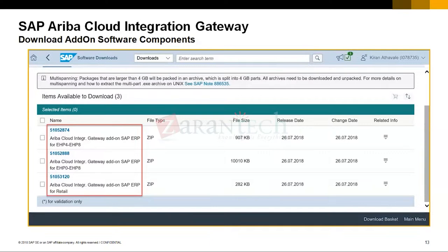So in that case, in the prepare phase itself, once we prepare our project plan accordingly, we have to inform the basis team and make it clear, like this is the scope and please perform all the activity from the integration point of view. So at least during the explore phase, we can perform the best practice integration. So in those cases, we have to do it early. Otherwise, generally, we perform the system setup during the realization phase, that means after the requirement gathering. But it varies from customer to customer. That answers my question. Thank you, Rohan.